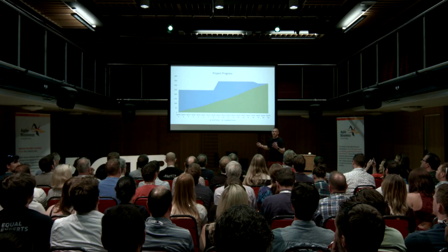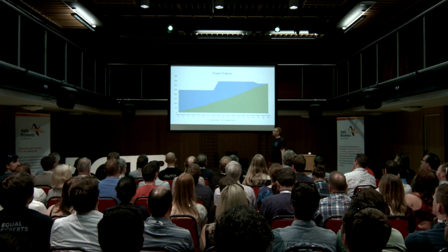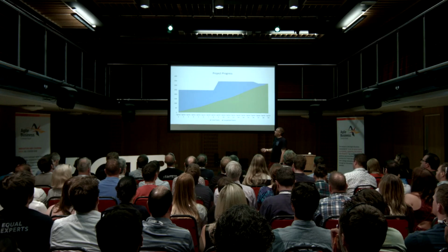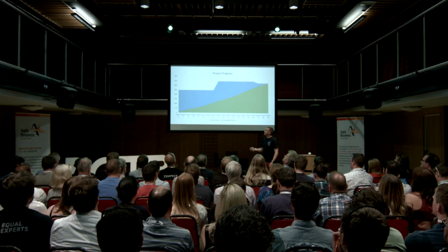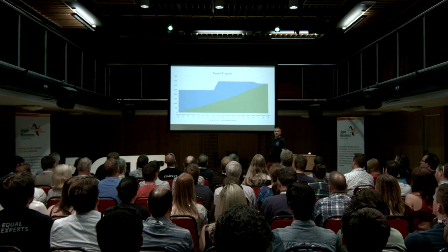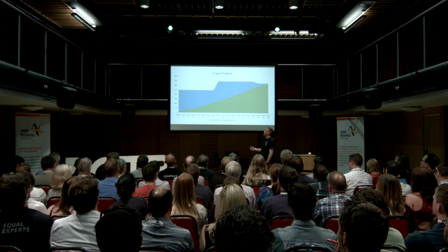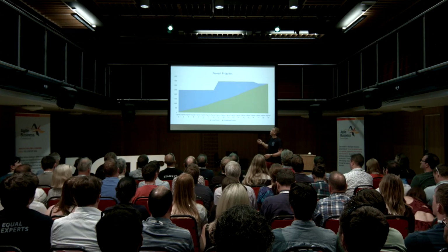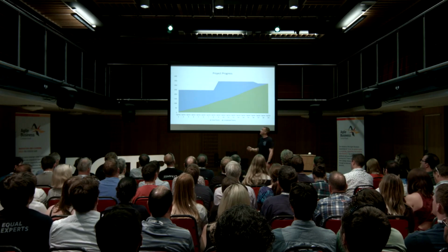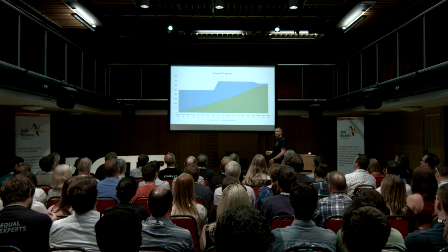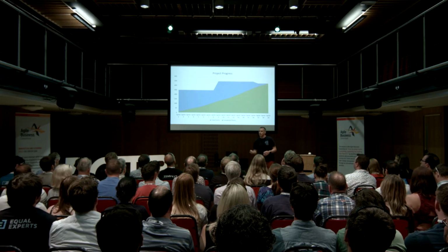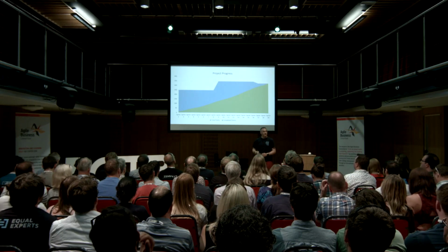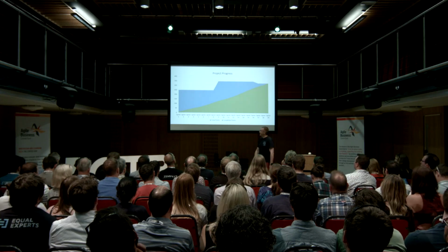They use something like this. A burn chart. Green is obviously work that's done. The blue bit is stuff that is still to be done. You start with some estimate at the start of how much work you've got, and it might go up at some point when you find there's more work to do. Then inevitably at the end, you suddenly decide some of the stuff you wanted to do is less important and drop it down, and we get to a release and everyone's happy.